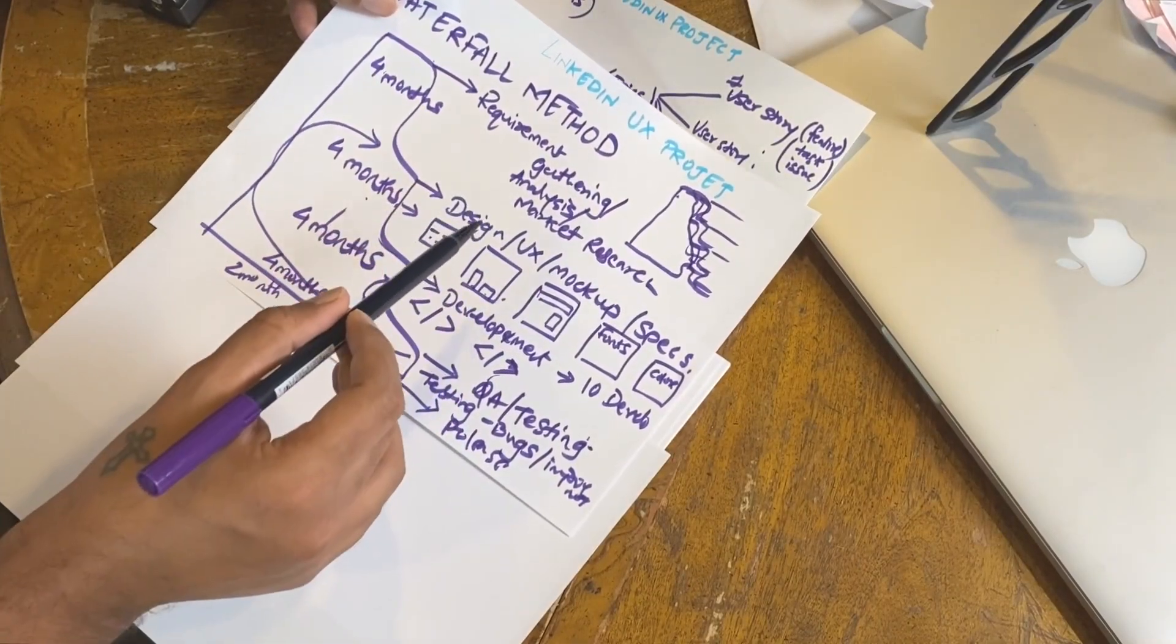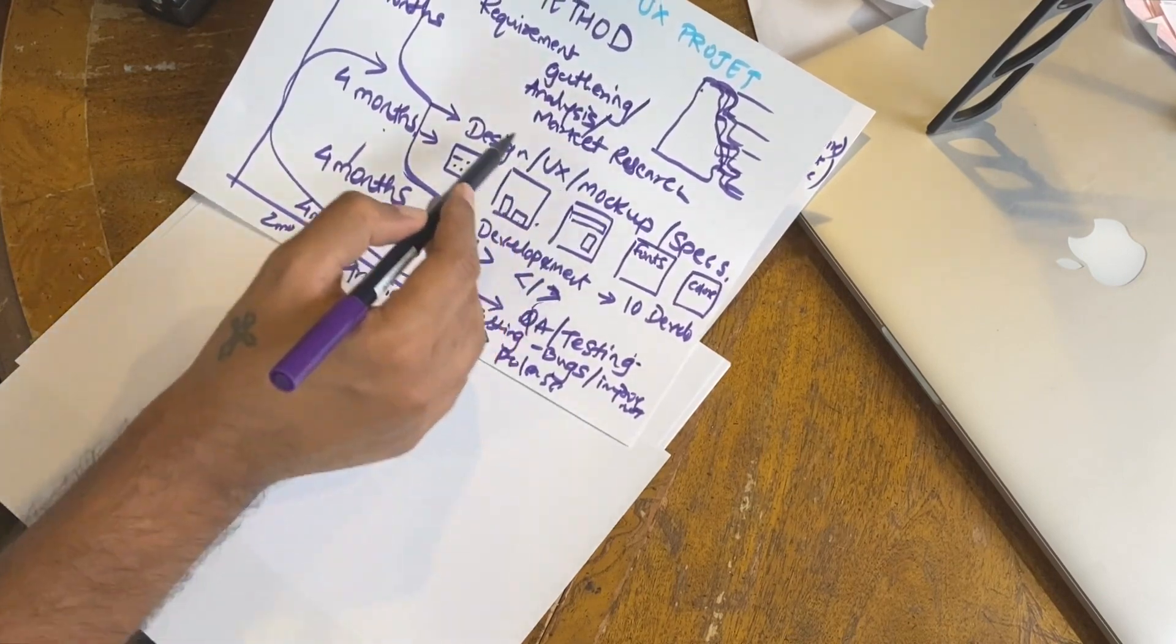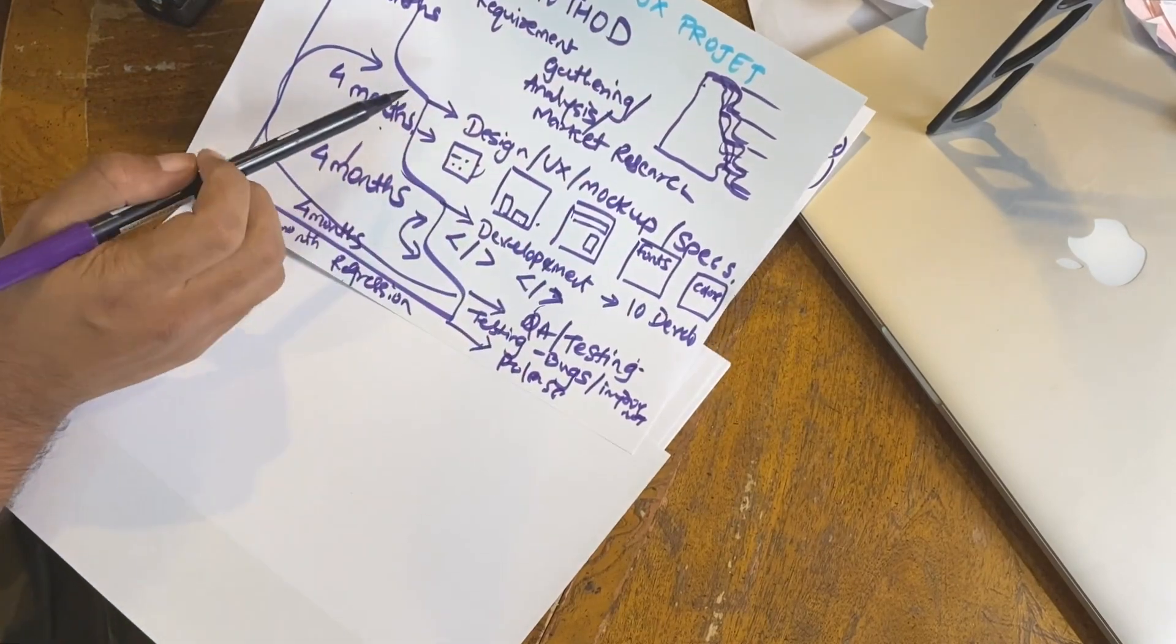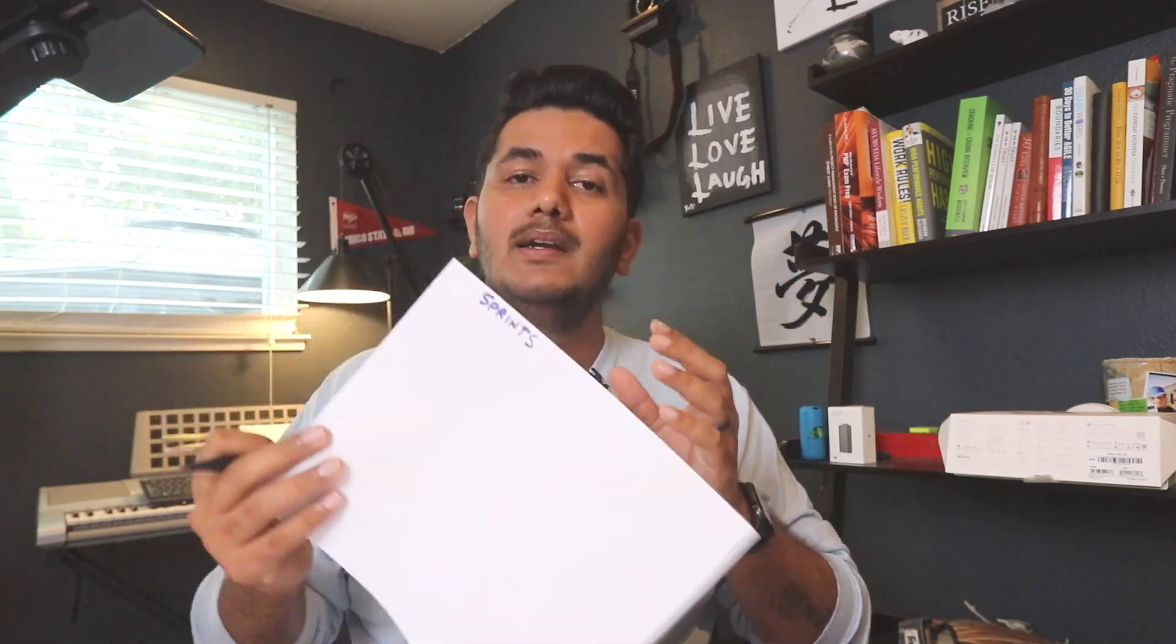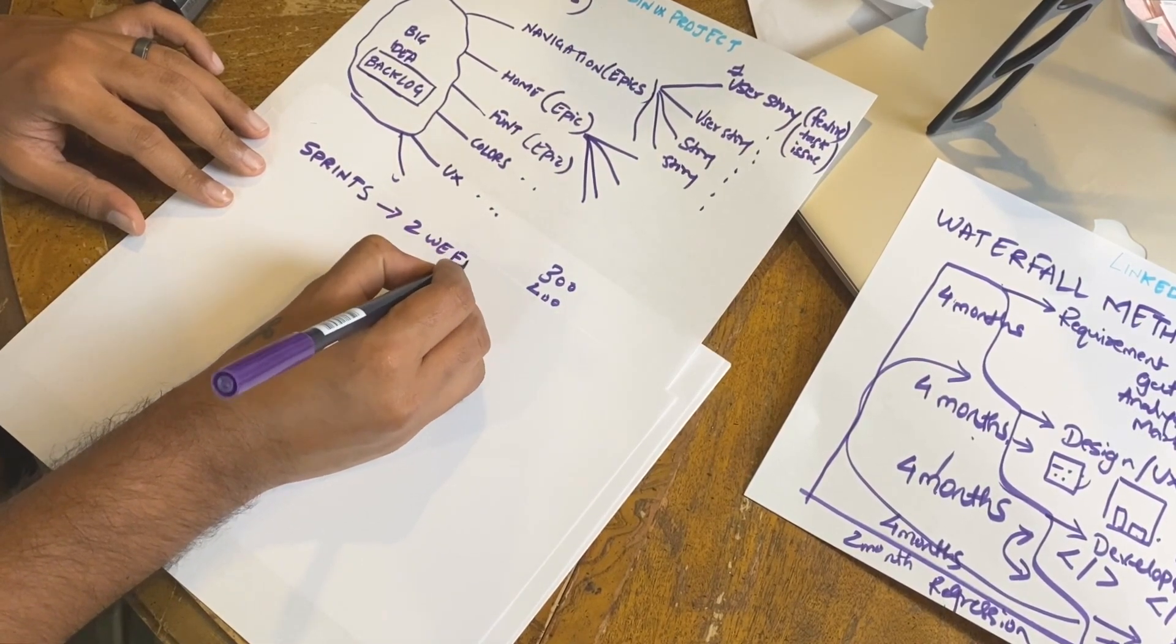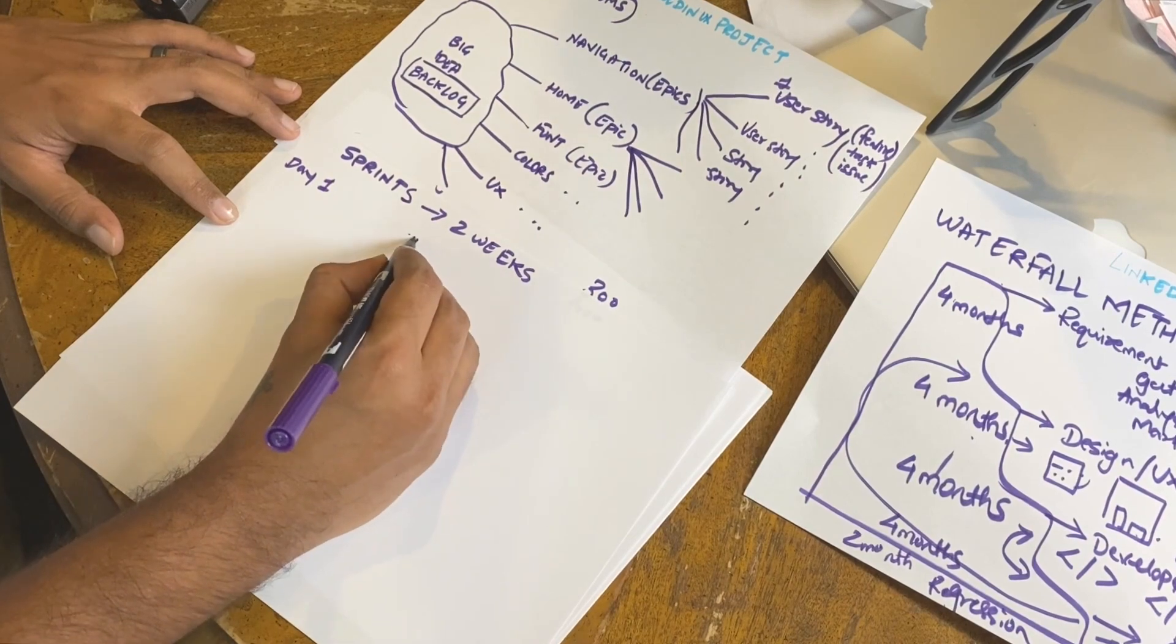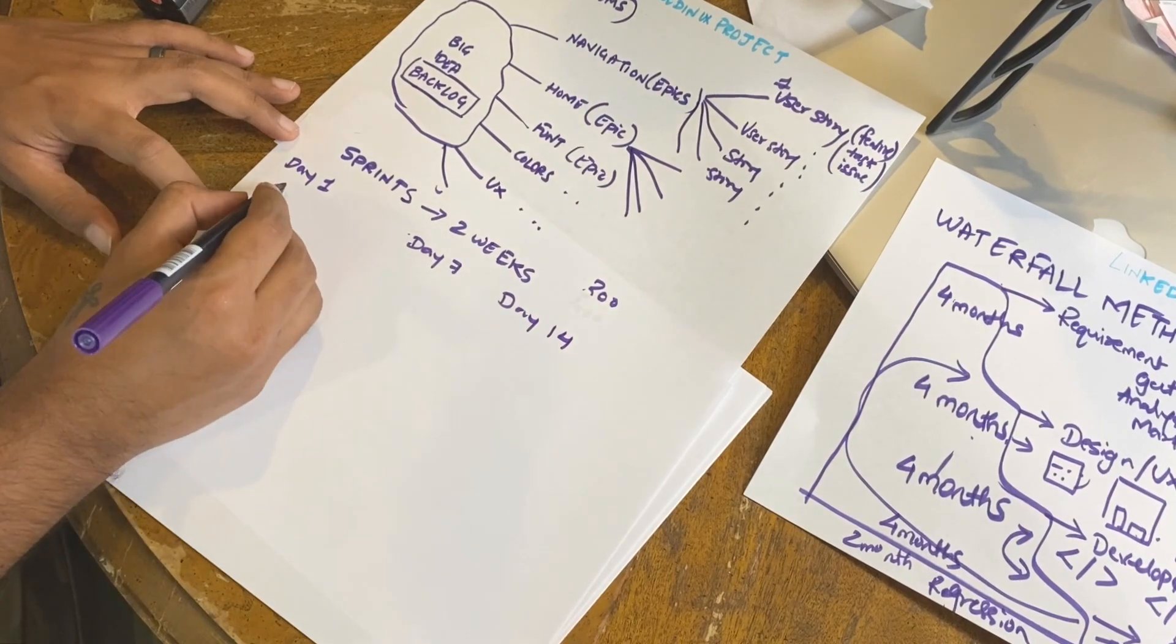It's a time box. They compile this entire thing into time boxes. The whole cycle - requirements, design, development, QA testing, etc. - all of this whole thing is compiled into one smaller time frame. Instead of completing everything, they do it in time frames which are called sprints. What is a sprint? Sprint is basically a time box or time frame, like a sprint in a 100 meter race. That 100 meters is a distance box. Same thing - a sprint is a time box for the amount of work going to be conducted. For example, most companies will have a two-week sprint. Let's say this is day one, day seven, day fourteen. This is one sprint - 14 days.